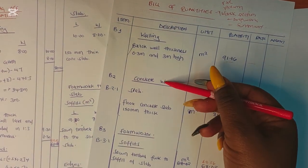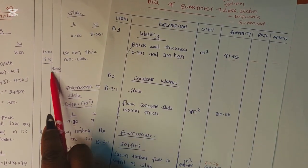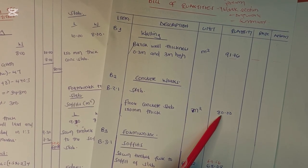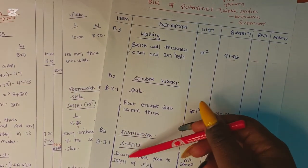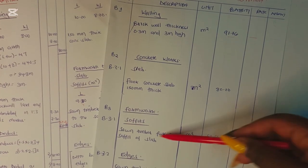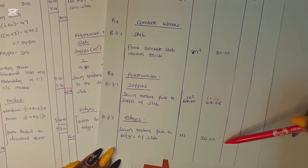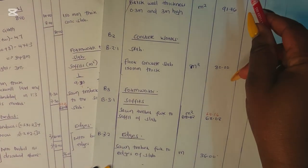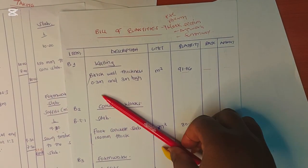For the concrete, you book it separately from the walling. The entry is: floor concrete slab, 150 millimeters thick — unit is square meters, quantity is 80. Then for formwork we have: timber formwork to the soffit of the slab — quantity 69.56 square meters. And timber formwork to the edges of the slab — unit is linear meters, quantity is 36. You insert the rates and amounts, total them up, then add the totals from the preliminaries and preambles for the work section summary.